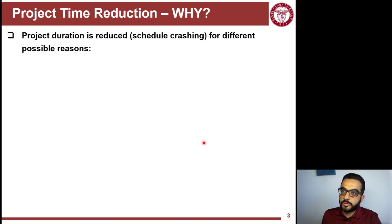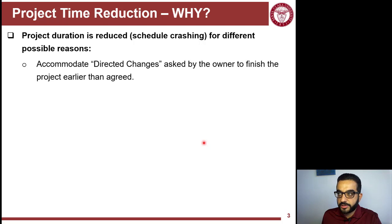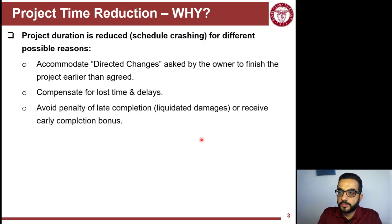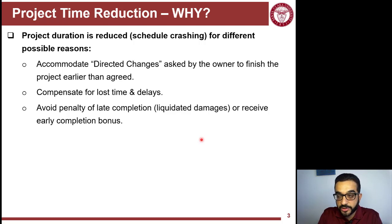There are different needs for reducing project duration. One is directed changes — contractual language in typical construction project contracts where the owner would like to change the agreed-upon schedule duration and directs the contractor to finish the project faster. Another reason is from the contractor's side: they did something wrong or did not expect certain site conditions that reduced productivity, so they want to crash the schedule to compensate for lost time and avoid penalties or liquidated damages.